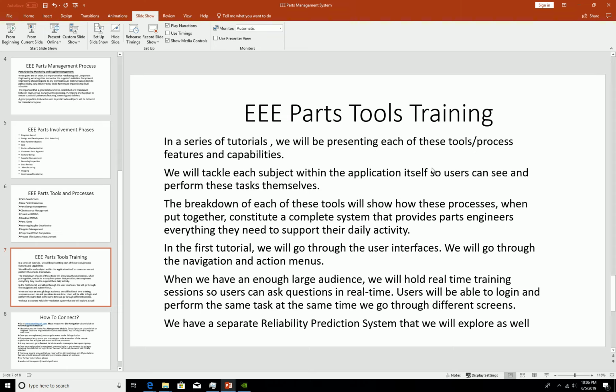If the part hasn't been submitted, that means don't go and ask component engineering, because the part hasn't been received. Let's go back to the supplier, or check with purchasing. Where are we? Or check your email, because based on the projection tool, this part should have been here, and we still don't have it. So you see, that means you have a system in place that does that for you.